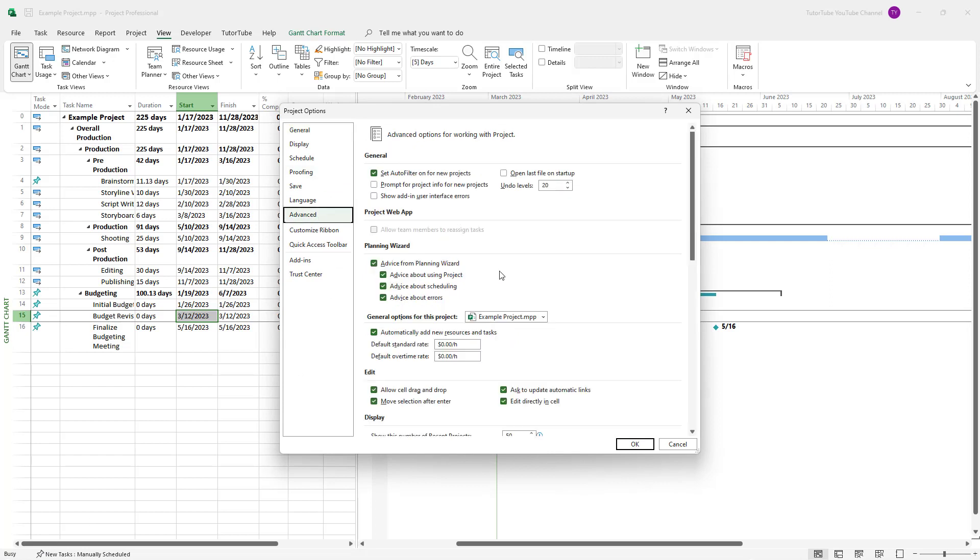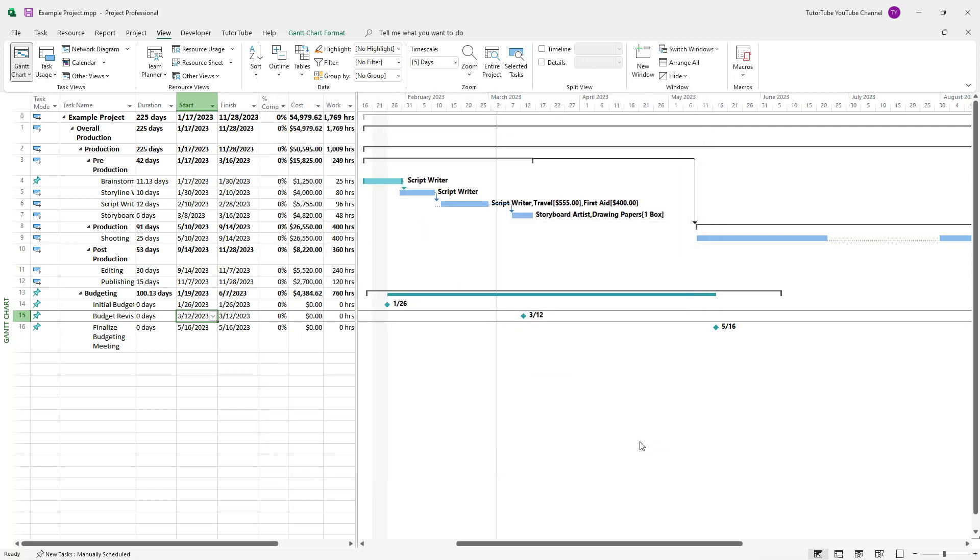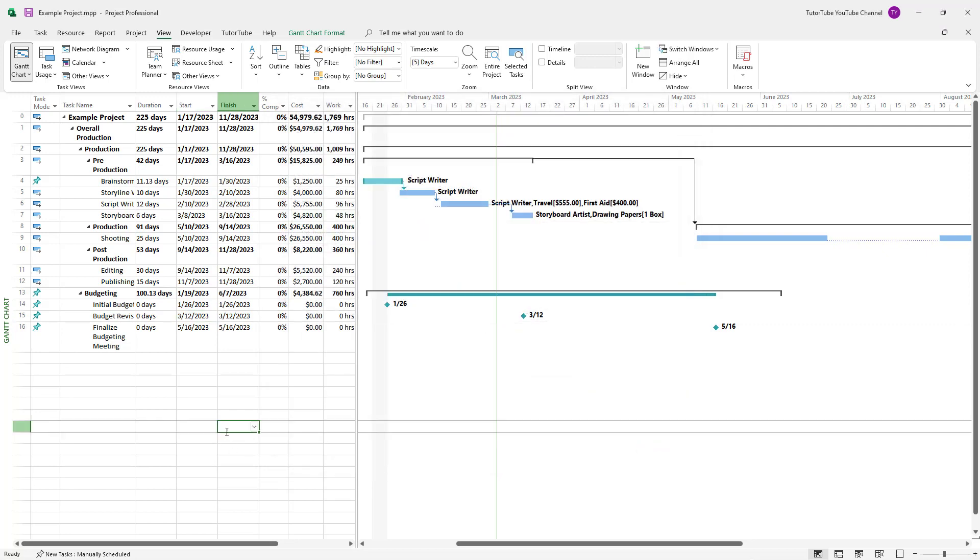And under Advanced right here, you can see automatically add new resources and tasks is an option. Let me just disable this and press OK right here.